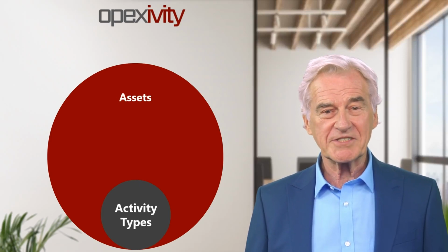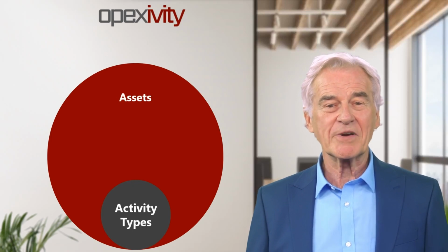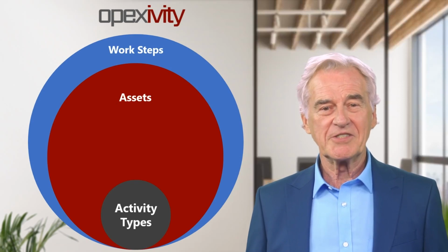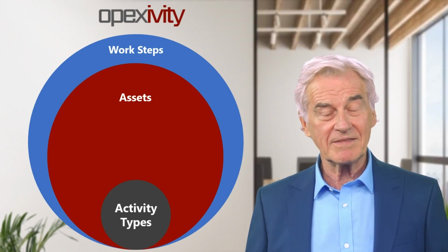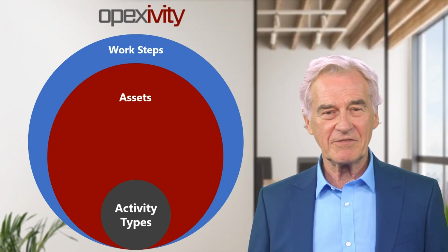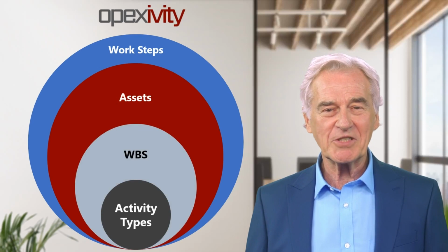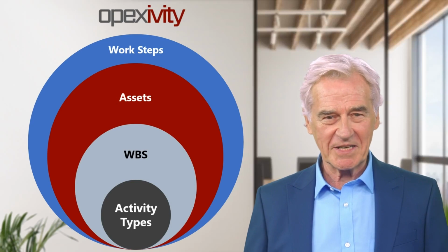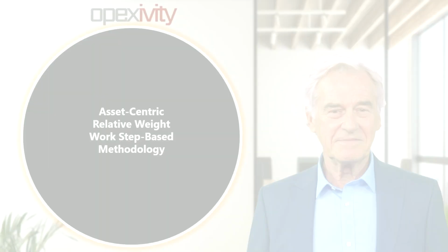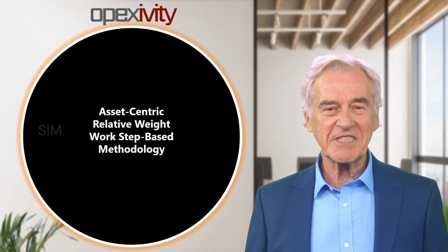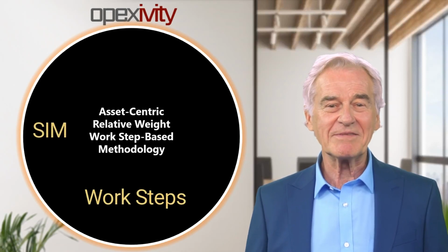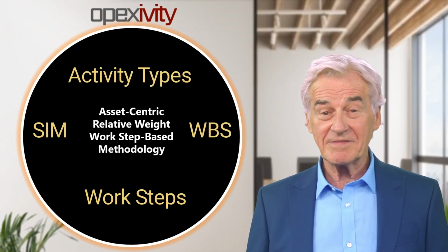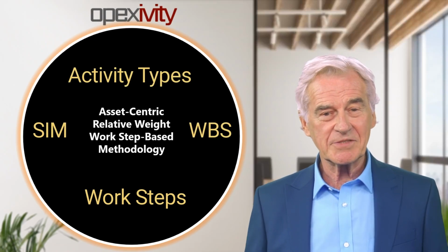At that point, a process is initiated to generate all the work steps for all project assets and deliverables and for all project phases. This process may result in tens or even hundreds of thousands of work steps, as for example in the case of a megaproject construction phase. These work steps need to be tracked for each work breakdown structure package, project phase, activity type, discipline, physical areas, and of course, work teams. So now we have a SIM, the assets database generated with the DAD application, and all the work steps for various project activity types allocated to the various WBS packages, which can be now assigned to various project teams.